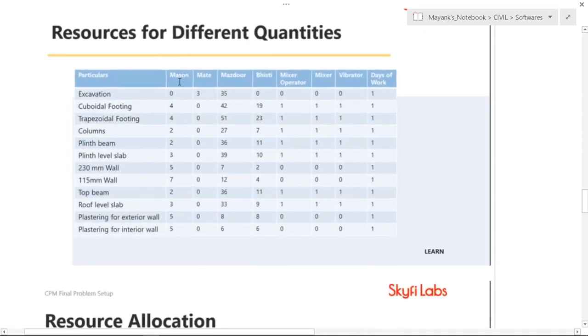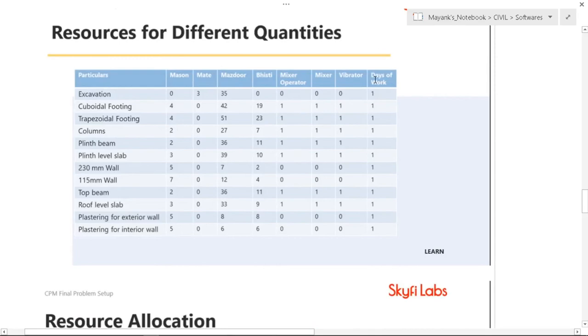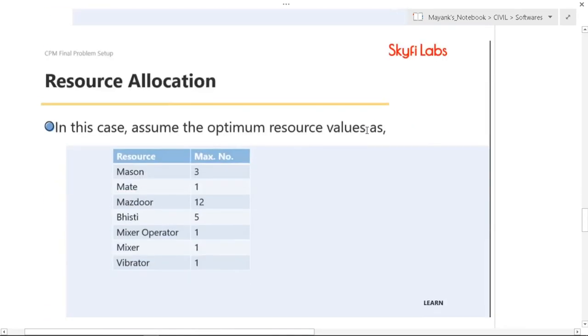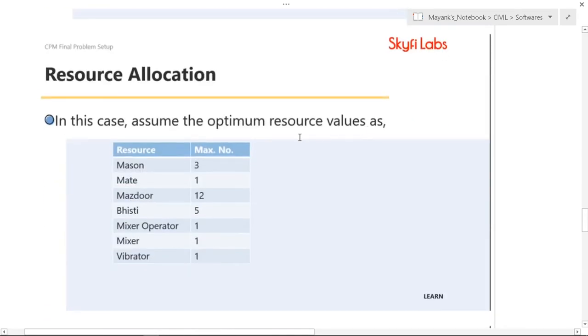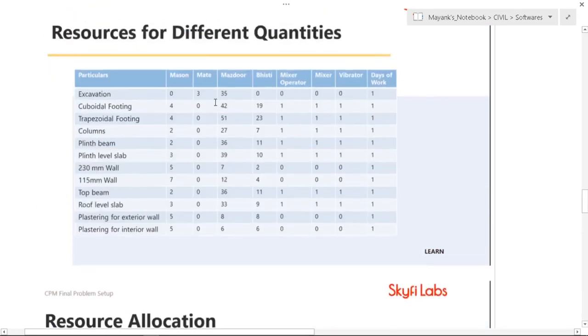So the resources for different quantities are this. As you can see for different activities, number of masons, mazdoor, mixer, mixer operator, vibrator. And these are for number of days only 1. So as you can see the variation is too much.